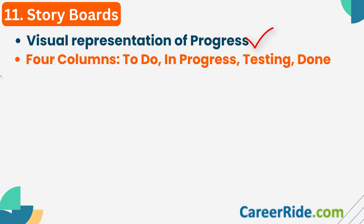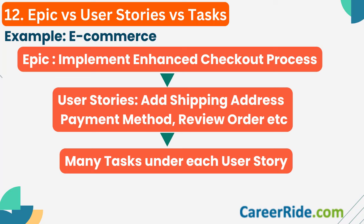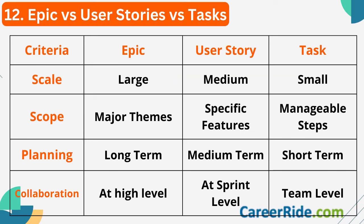Question number 12: differentiate between Epic, User Stories, and Tasks. Looking at Epic, User Stories and Tasks, you can see a hierarchy where Epic lies at the top, followed by User Stories and Tasks. In an e-commerce example, an Epic could be 'implement enhanced checkout process.' It can have various user stories under it, such as 'add shipping address,' 'select payment method,' 'review the order,' etc. Under each user story there can be many tasks to implement it. The progress of an Epic can be tracked across various sprints.